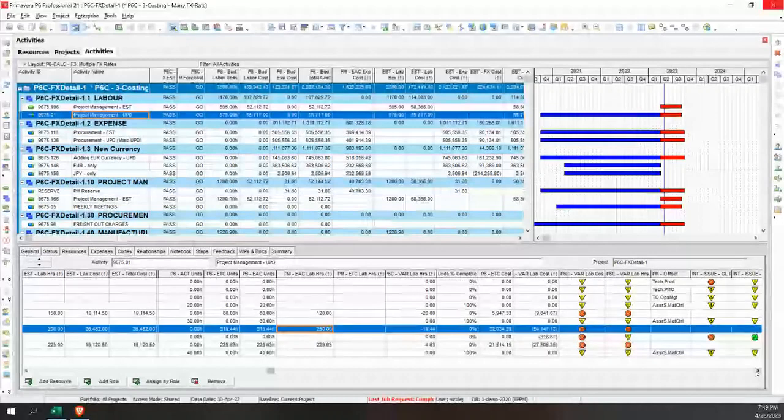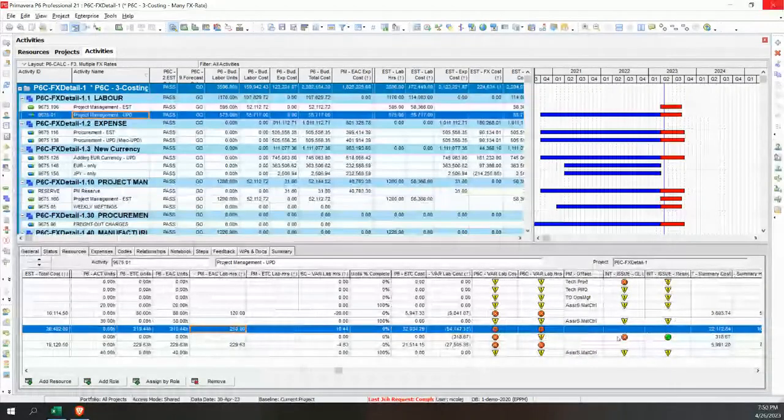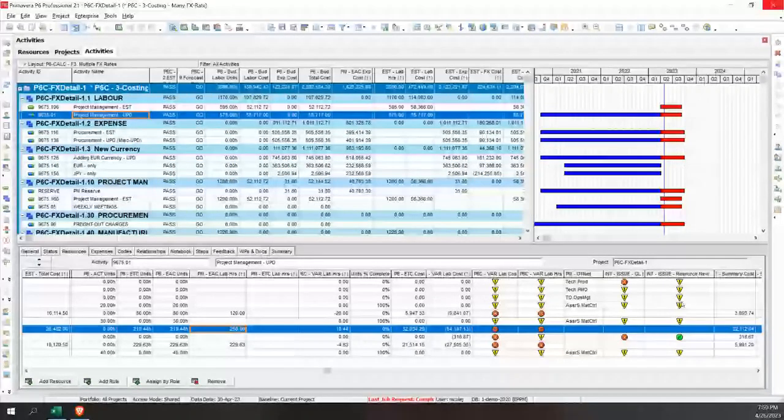When we're doing integrations, we always put flags for the integrations. So in this case, this is flagging that we got new resources that hadn't been part of the plan have been loaded in here. Okay, so that way we can easily find them, we can see them, we can report on them, we can make sure that we can filter on them, right, in different layouts.